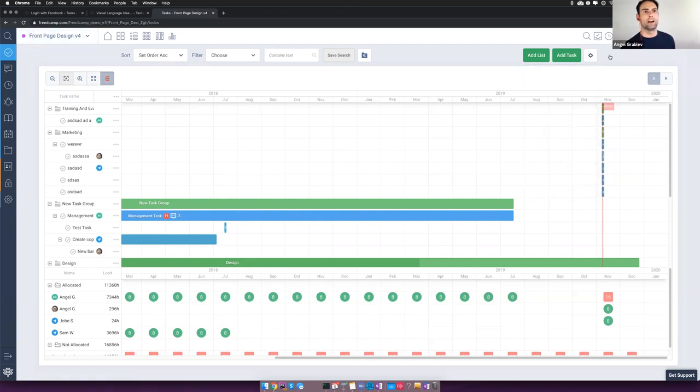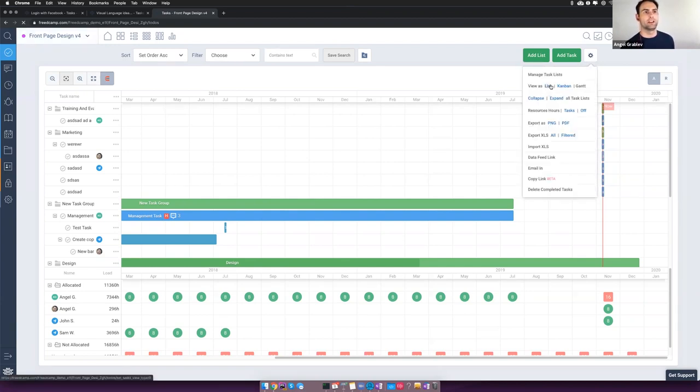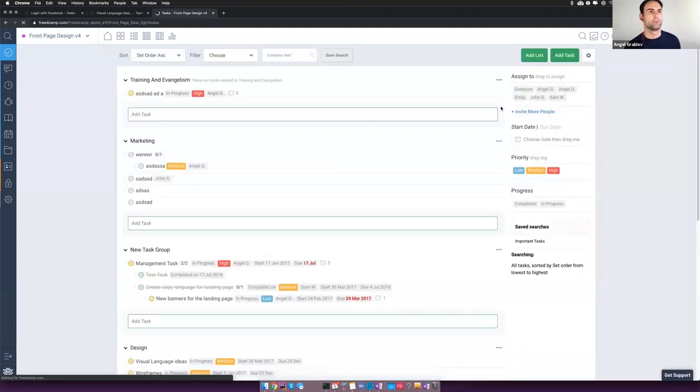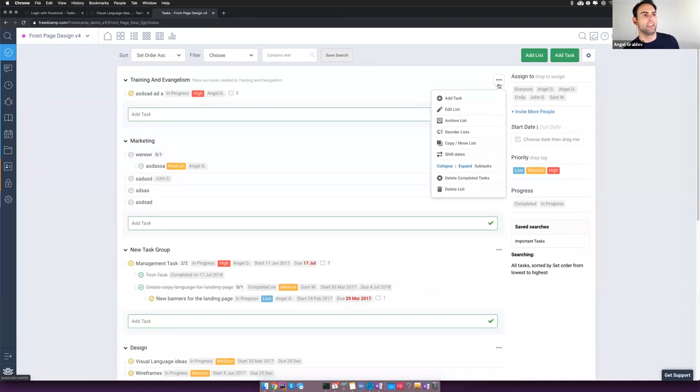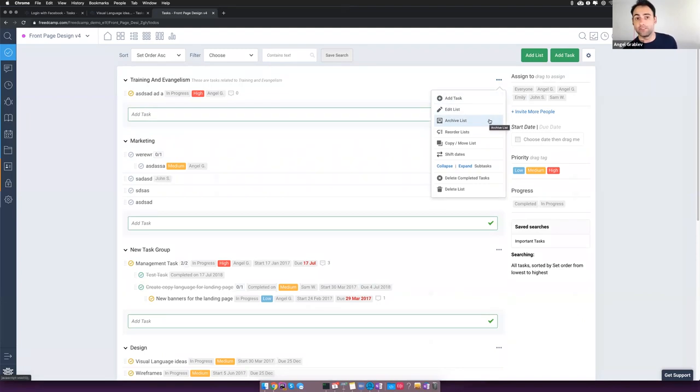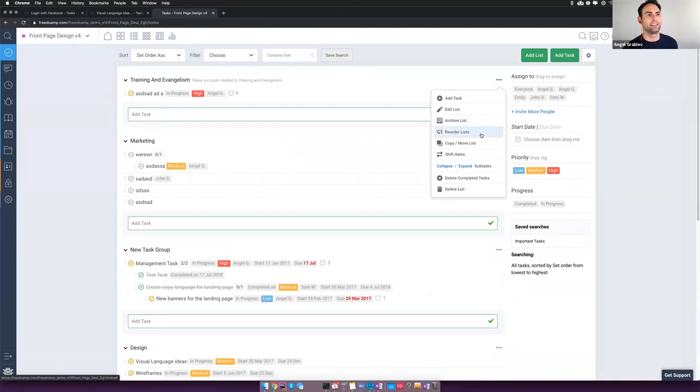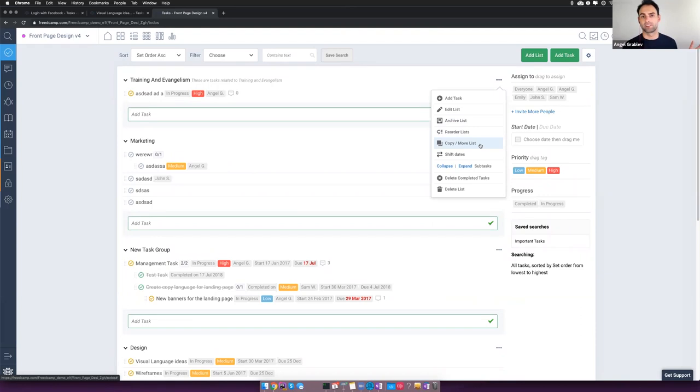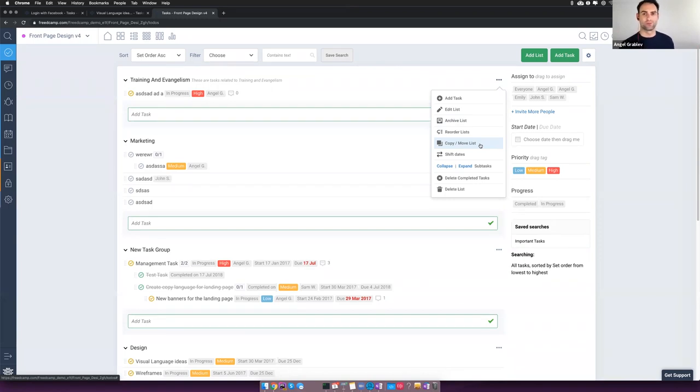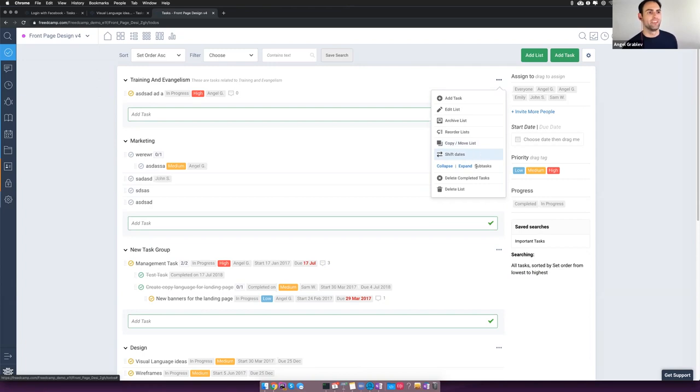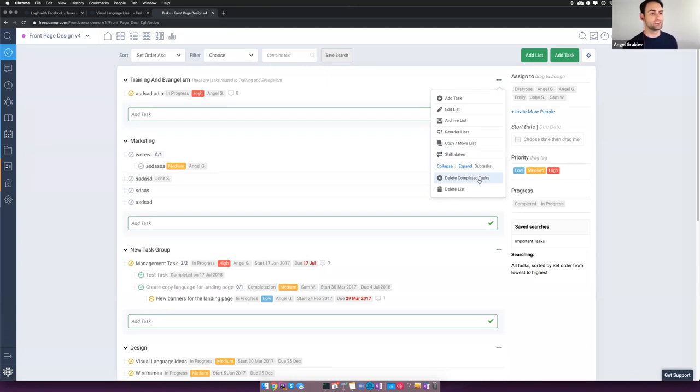If we go back to the list view, I do want to point out a couple more features here. Next to each list, you find a large set of features. The more important ones I want to point out are you can archive a list. Then you can open up the archive list of lists. You can reorder the list pretty easily. And one of our favorite features is being able to actually copy or move lists. If you have a list that you realize the exact same work is going to be done on another client's project, you can just copy the list over. You can automatically shift all the due dates. So it saves you time if the team's all late.